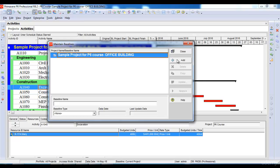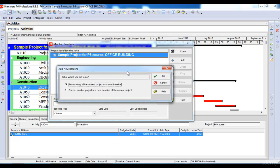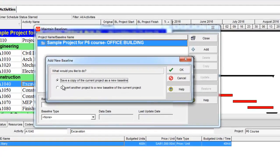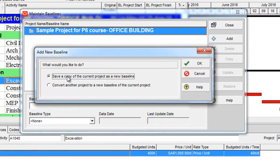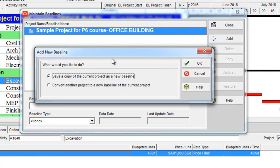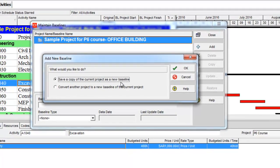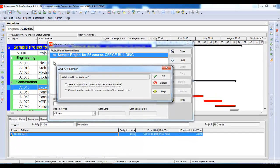Once I click the Add button it gives me an option: shall I create a new project, or convert another project as a baseline to my current project, or save a copy of the current project as my baseline. What I will do is save a current copy of my current project as my baseline. After selecting this option I will just click OK and wait for a while.